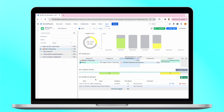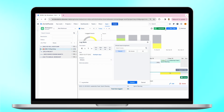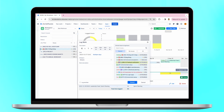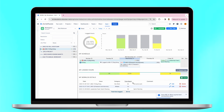You can also find the built-in time tracker that helps you to calculate unlogged work time accurately. Just click on it when you start and stop when you finish. The work log dialog will open and the time tracking fields will be filled in automatically.